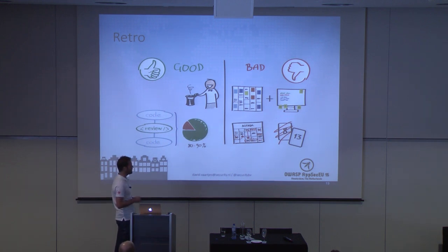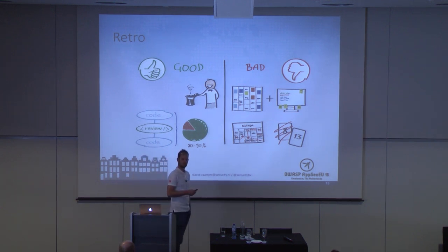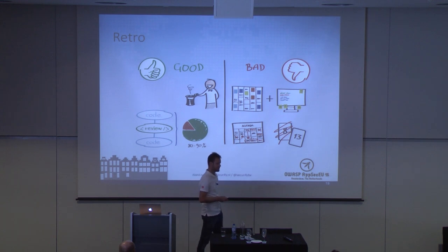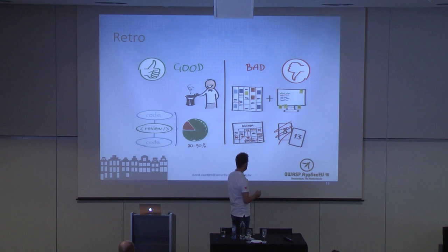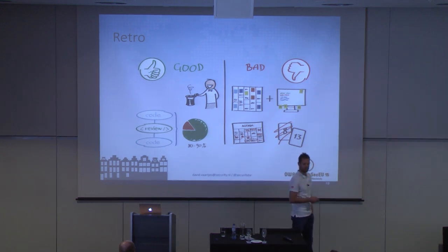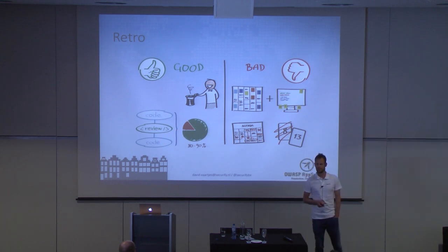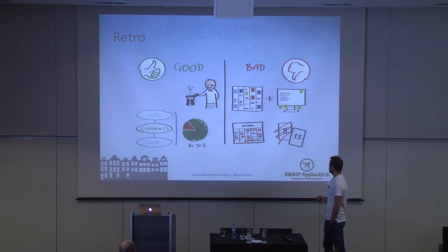A bad thing is the planning part, which was a total hell. I couldn't keep up with it. Another thing is that we were not fully integrated into their tooling. So we were tagging user stories, but we weren't adding tasks to it. So we weren't part of the grooming, pokering as well. So stories that were pokered or assigned 8 story points, including our activities, might have been 13. So we were cheating a bit.